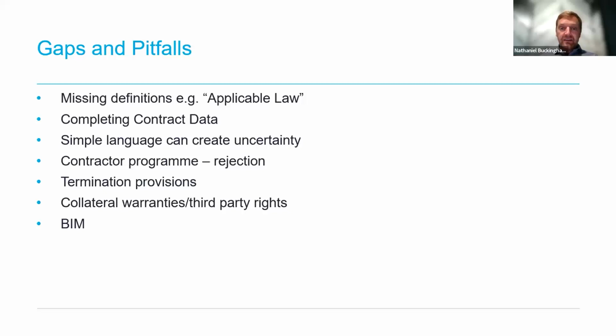Now, the downside to this approach really is that some of those standard terms, which the drafters have avoided because they're too legalistic, actually have quite a history of case law behind them to provide certainty as to their meaning. The simple language used in the present tense in NEC4 can therefore actually create uncertainty when trying to apply it to real situations and against previous case law. And so, again, we typically see amendments to bring in these standard terms and definitions for clarity.